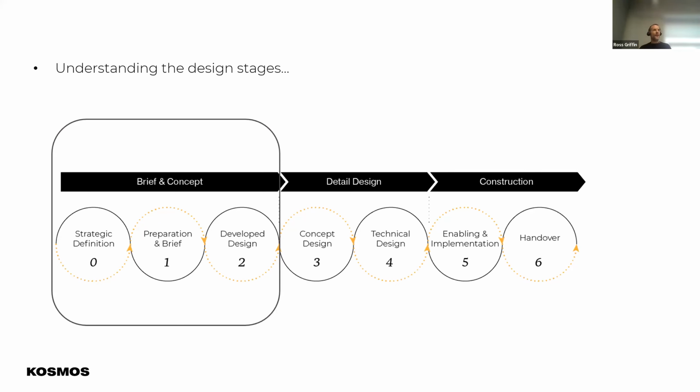Yeah, I think we need to be clear here that we cannot expect that level of detail from all disciplines at each stage, because unfortunately each discipline's delivery is almost staged. But by the time you get to that technical design stage 4, everybody should be caught up with each other in terms of that LOD 350, for example.